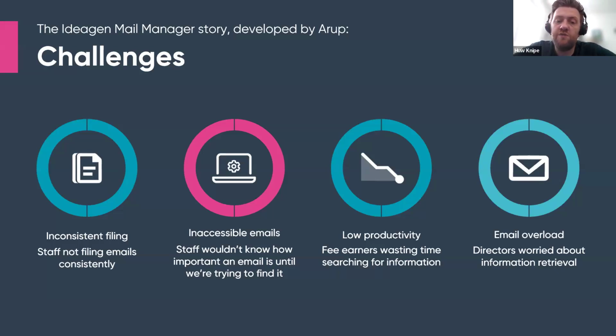So the two big issues they had were project teams didn't have up-to-date information on their projects, especially if they were new to a project or one of their team had left. And the other big issue was risk. They had to retain their data for up to 14 years after a project had finished in case of any claims or litigation. There was a chance that the information would be able to be found, but it would have been extremely time-consuming to do so.